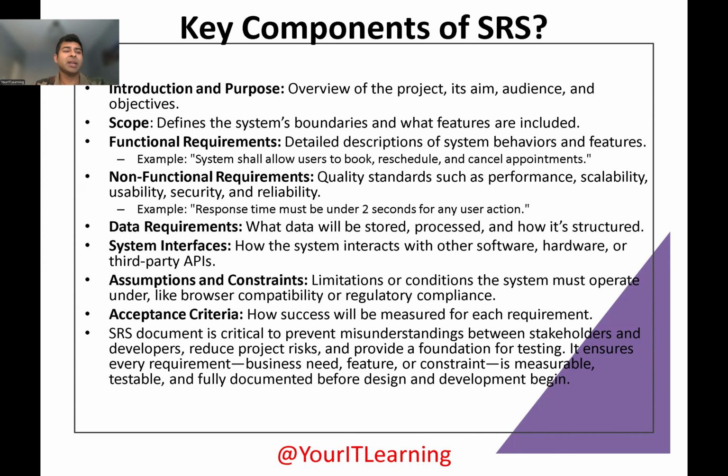The developer has to develop it, the QA tester has to test it, and it will take another sprint. Just think about what one sprint will cost. If we have 3 developers, testers, product owner, and scrum master, it will easily be $1,000, and that can be avoided if we make sure that we understand the requirements right initially.